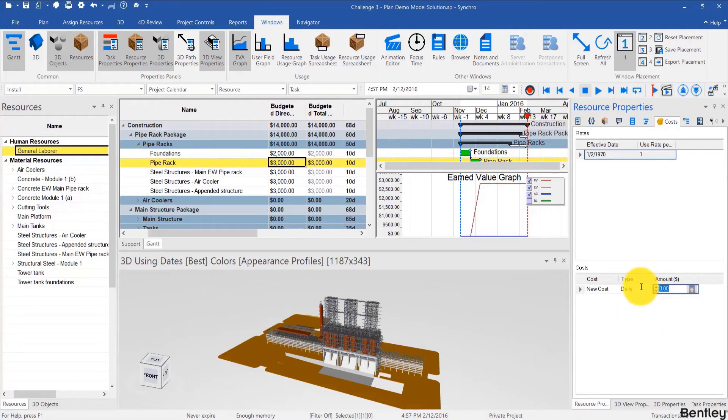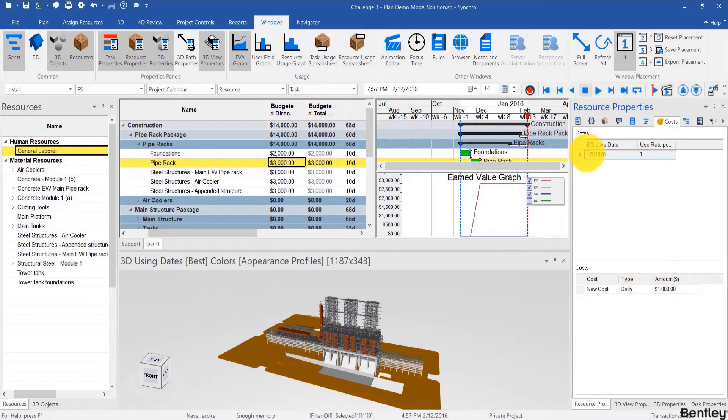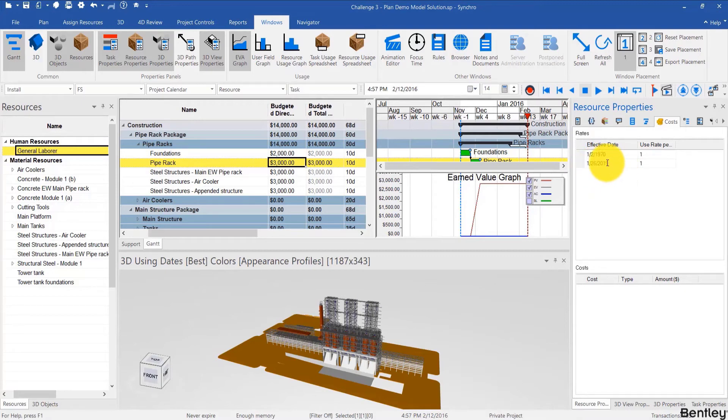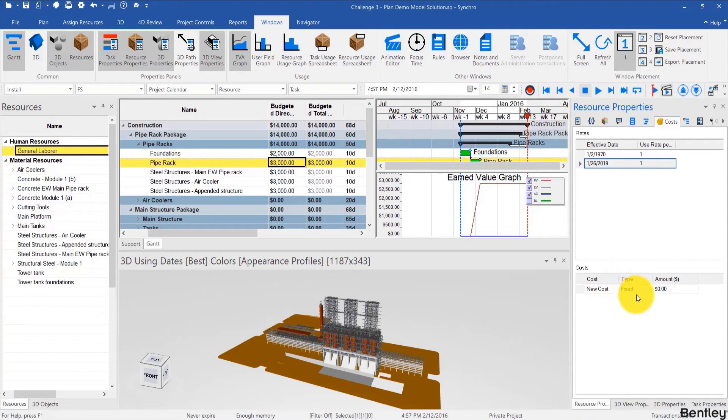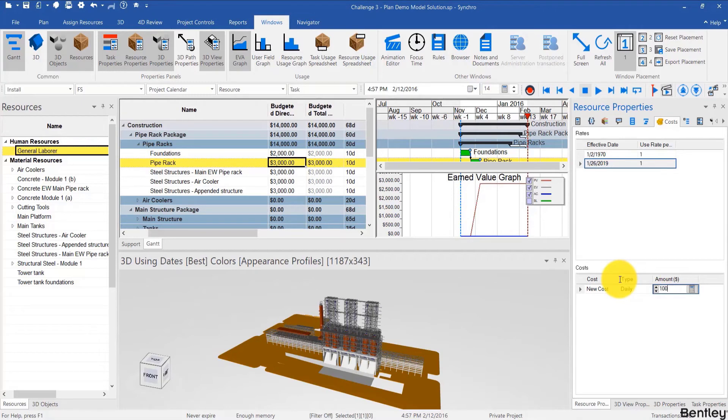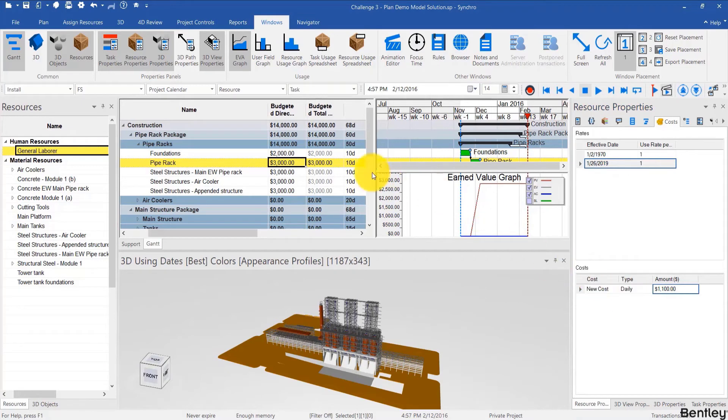And let's say a daily cost of 1000 bucks and maybe over the course of the project. So let's pick a date, today's date and it's going to change to a daily cost of 1100. So that's how these costs per resource can vary.